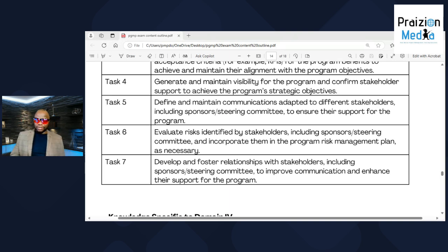And I've learned my lesson. I've been burned on previous encounters where a stakeholder said on a program, be aware of this. And due to our ignorance in this firm, we ended up paying a big price. We were not called back into the next year of the program because we made a blunder by not managing the risk the stakeholder identified.